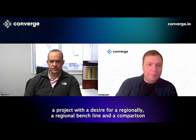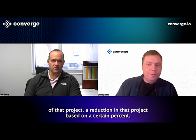So typically how low GWP projects are sourced now, we get a project with a desire for a regional baseline and a comparison of that project, a reduction based on a certain percent. Some are asked for 15, some ask for 20, some ask for 25. I've seen a lot of 35% recently. What that means is InterCA in 2020 released a report based on regional benchmarks. It's highlighted in ACI 323, which Dr. Matt Adams just recently put out.